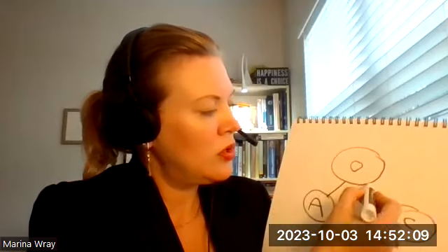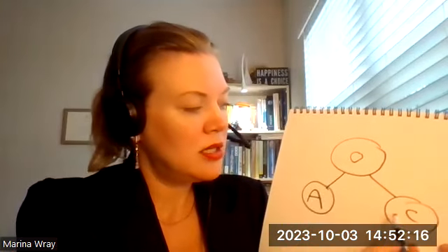So the next thing is we are going to go through the traditional design, bid, build, and this is how it works. There is always an owner, and I'll put an O here, the architect here, and the contractor here. The owner has contractual relationships with both the architect and the construction management firm or contractor.